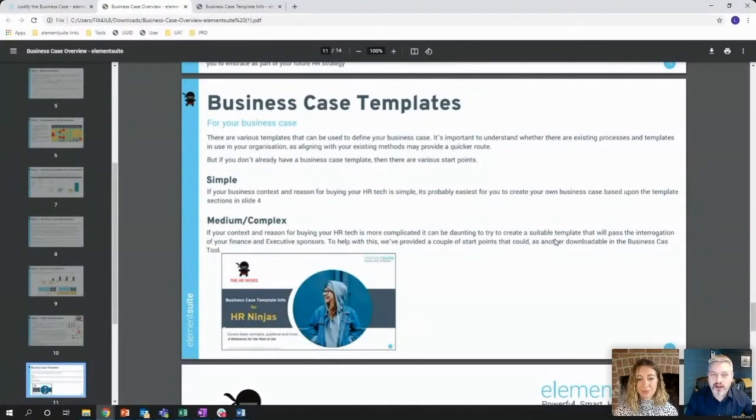But set yourself up for strong business change, and bring your business change team in right at the beginning of the project, so that they're able to support right the way through, understand what it is, and articulate that back to the business. If we're just putting an engagement portal in, you might be able to do 60% of the project before you bring your business change guys in, because those are fairly out-of-the-box, straightforward things to deliver. You've got to think about the bigger picture as well, haven't you, Lee?